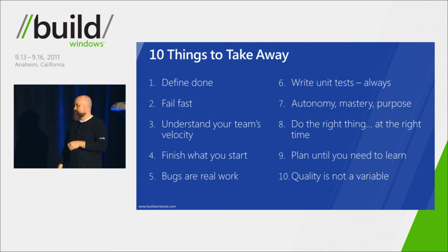It's always much better from a business value perspective, a constant stream delivery of value, to start one, finish it, start another, finish it. I've found that sometimes our engineers resist this idea. They're not always very happy about this. They think it'd be more efficient to parallelize it. Until after a few sprints of parallelizing it, they realize we're not delivering at the end of those sprints. We're not finishing. Me, as the product owner, keeps saying, where's my stuff? Where's the beef? I want to have it done. I'd rather have you deliver me one good story every sprint than 5 stories half done.